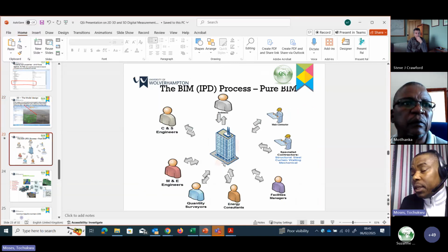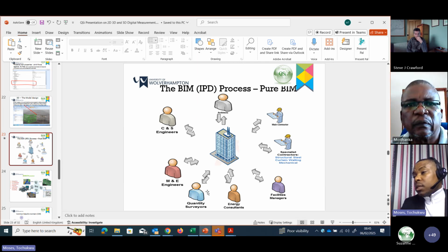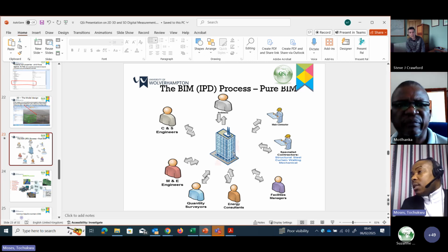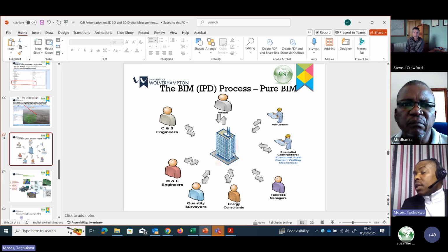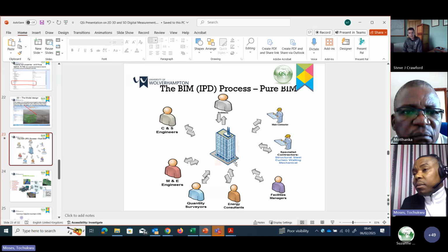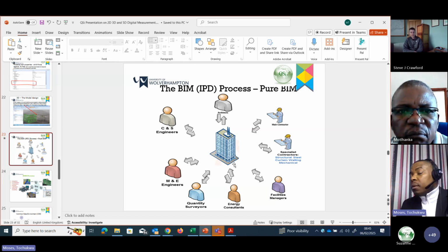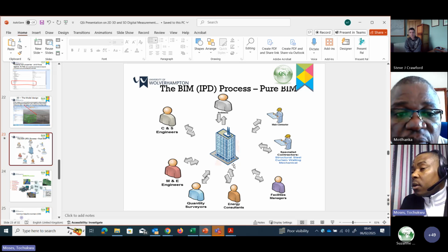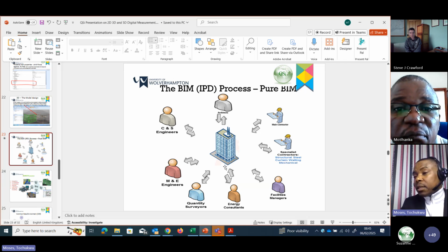more underpinned by BIM. So you can see the QS here is inputting information back as advice to say, oh, we have a cost ceiling here, we have £5 million to spend, and then in the phases of this particular design, this is a cost ceiling per each phase of this design. And I think maybe the substructural phase or superstructural phase or whatever phase it is, you've actually exceeded. So this is where I think the cost issue is coming from. And then this element, actually we can look into it and see if there are alternatives.